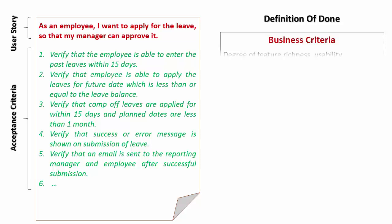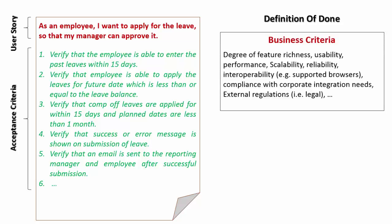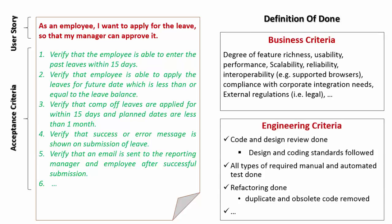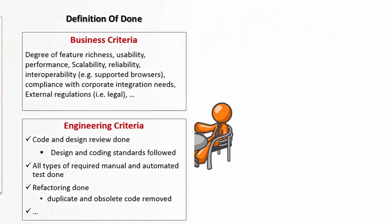Apart from your criteria — the business criteria — we add our own internal process checklist. For example, is it reviewed, tested for quality, etc. All this forms the engineering definition of done. We say a requirement is complete only when both the business definition of done and our engineering definition of done are met.